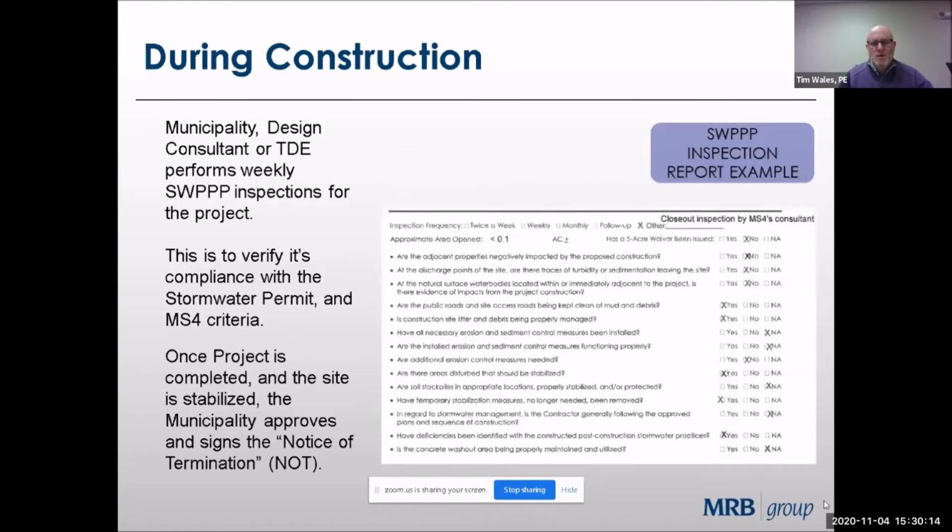All right, so just some more SWPPP requirements during construction. The municipality or their design consultant or someone has to perform weekly inspections during construction to make sure sediment is properly managed and stormwater is accounted for. It's a verified compliance with the stormwater permit and the criteria of the MS4.